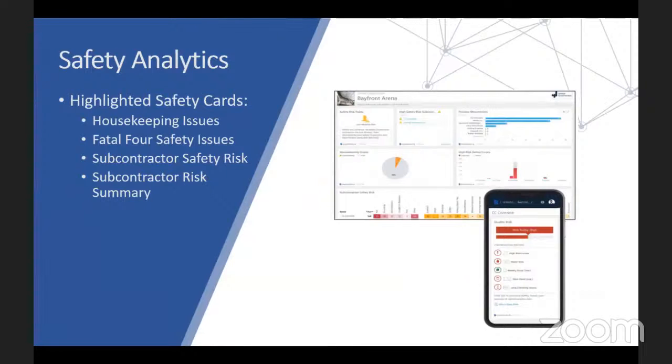So, safety analytics. BIM 360 tracks safety-related data like near misses and at-risk behavior through the logs, issues, RFIs, checklist items, etc. Construction IQ analyzes this data as leading indicators and helps predict safety issues before they become serious incidents. The data is visualized on the Safety tab within the Insight module, as well as through select cards in the card library and also in the project home.